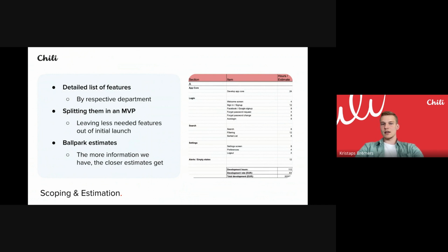The estimates are made by a project manager and the respective person from each department. Like in design, estimates will involve not only the project manager, but also a designer, and the same goes for our mobile developers and backend developers as well.